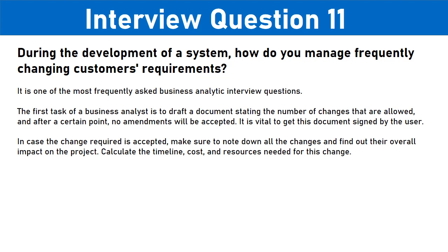In case the change required is accepted, make sure to note down all the changes and find out their overall impact on the project. Calculate the timeline, cost, and resources needed for this change.